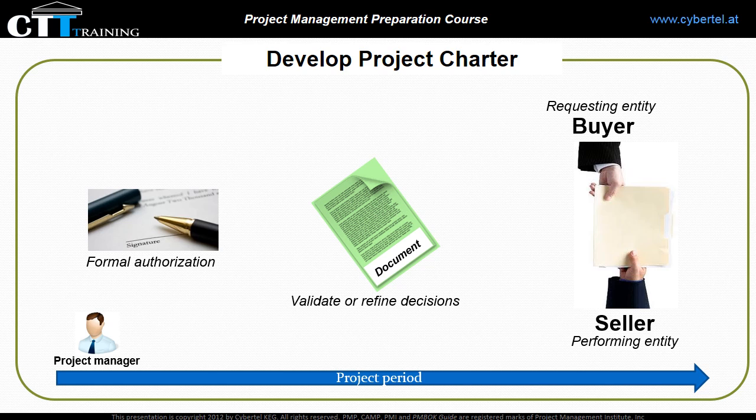It is really very useful if the project manager is involved in developing the project charter, because understanding the initial requirements at the start allows efficient resource allocation. A project exists with the existence of an authorized and approved project charter. And the reason for doing projects is business need or external influences.